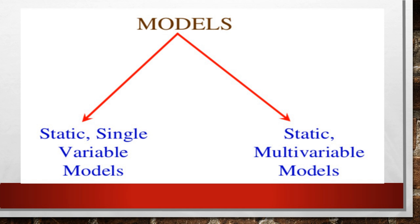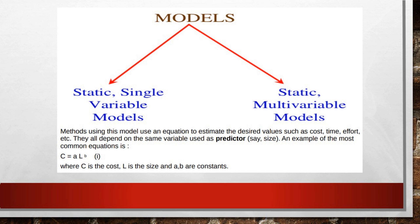The static single variable model approach was proposed by the Software Engineering Laboratory (SEL) of University of Maryland. The static multivariable model was developed by Watson-Felix at IBM. In both models, an equation is used to estimate desired values such as project cost, estimated time, or project effort. All estimation depends on the same variable used as a predictor — for example, lines of code size or function point size.